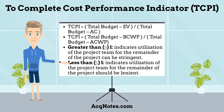The final cost variance type is To Complete Cost Performance Indicator, or TCPI. It can be calculated as: TCPI equals Total Budget minus Earned Value divided by Total Budget minus Actual Cost, or TCPI equals Total Budget minus Budgeted Cost of Work Performed divided by Total Budget minus Actual Cost of Work Performed. TCPI is an index showing the efficiency at which resources should be utilized for the remainder of the project. A TCPI greater than 1 indicates utilization should be stringent; a TCPI less than 1 indicates utilization should be lenient.